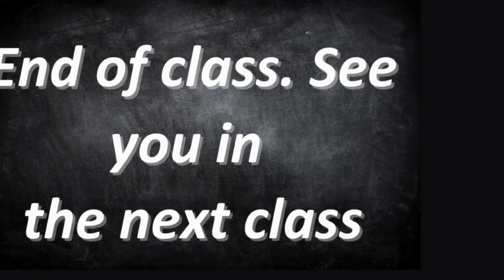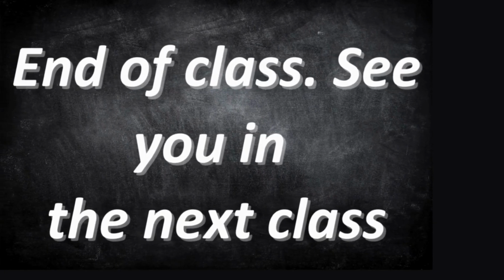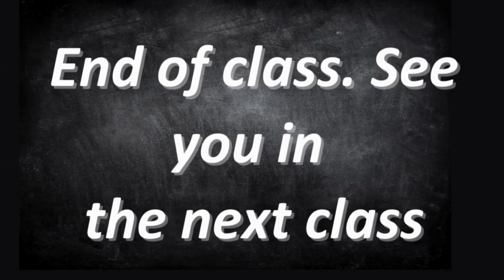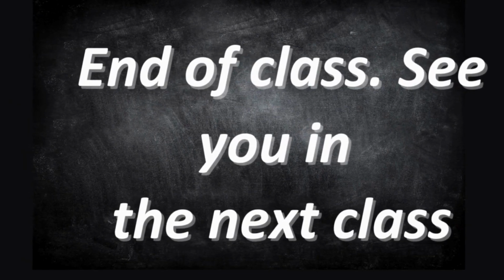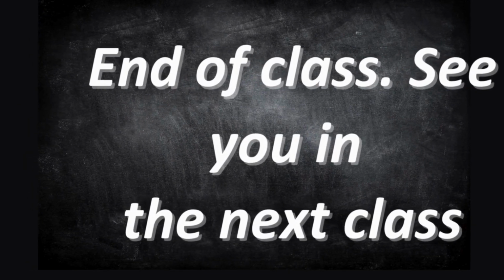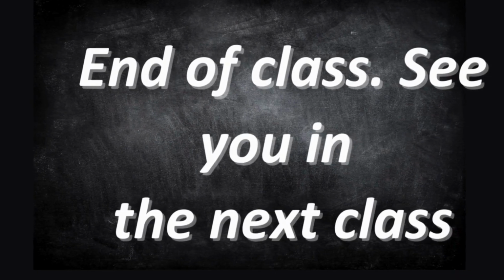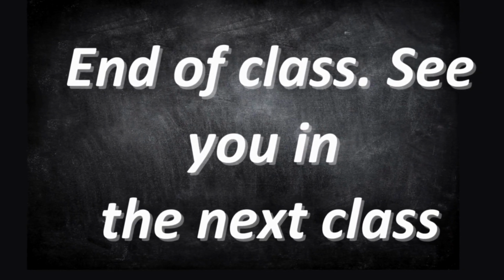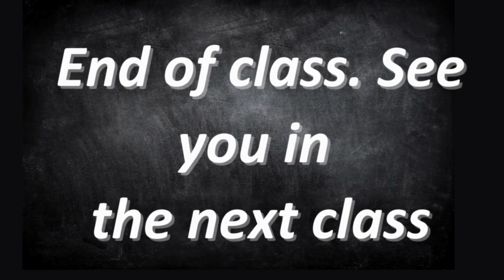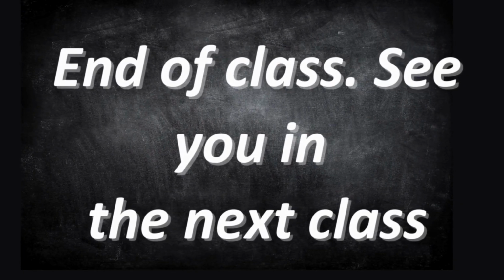So this is the end of this particular survey class. Survey is very important. It's a core part of this job. You have to document and write down and do a proper sketch of how the cable will route and pass. Factor it into your quotation, and so when you are implementing, you will not have problems. Thank you very much.